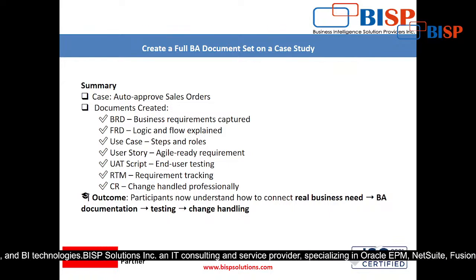And then once the document is reviewed, and the requirement is reasonable, the demand is reasonable, in that case, again the same procedure. You have to put that requirement everywhere in the business documentation, like the BRD, then in the FRD also, and then the use case also. All those documents will be updated, and after that it is called okay, all the changes are handled successfully and properly, right?